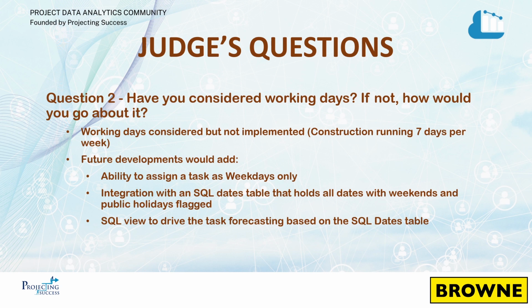We didn't consider working days when designing this, as in our construction we're running 7 days a week. But in the future, we would probably add the ability to assign a task as a weekdays only task, and this would avoid public holidays. To do this, we would integrate with an SQL date table, and this holds flags for weekends and public holidays. From this, we would drive an SQL view that would drive the task forecasting based on the SQL dates table and this integration.